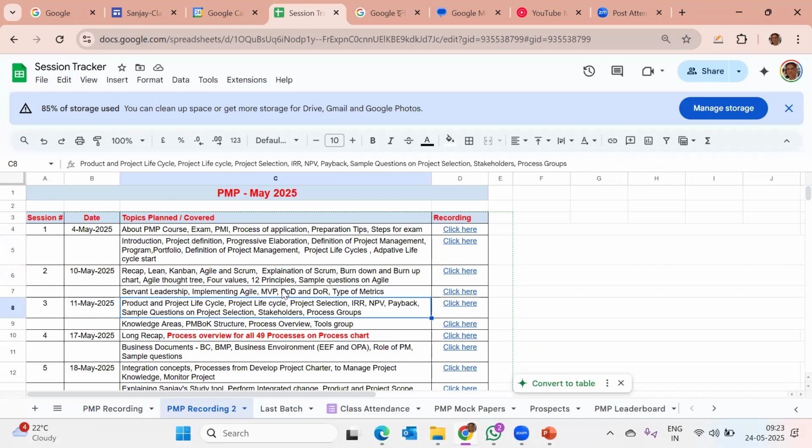Remember, friends, whenever there is IRR, that's the topmost priority. If there are other confusing numbers, the first thing we take is IRR. You should go with that, because it is a back calculation considering all the factors. If IRRs are the same, then only you should look at others. IRR being negative means you are going to lose money in that project. So that's the basic first thing. Then comes NPV, payback, and so on. NPV negative means the project is going to make a loss for you. If NPV is positive, then the one with higher NPV is the better project. So those are all the aspects there.